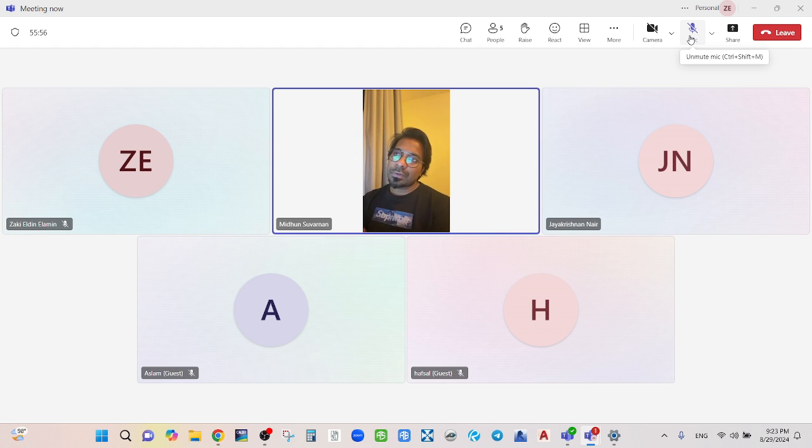I won't say give and take. It will be like a relay running race. You give the tender bond first, you run. Then you have performance security. Then you return the tender bond, and you have security for the rest of the project.